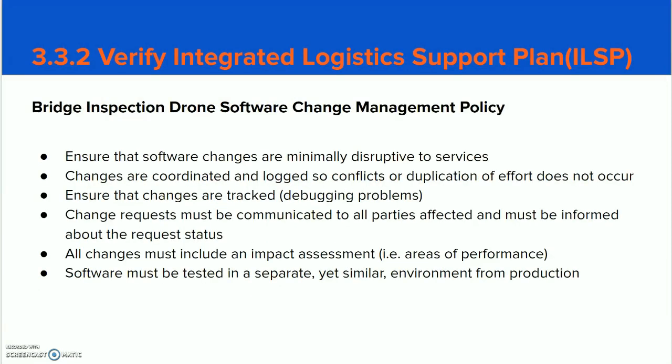Our change management policy will ensure that software changes are minimally disruptive to services, that changes are coordinated and logged so conflicts or duplications of effort do not occur, and that the changes are tracked. Change requests must be communicated to all parties affected, all changes must include an impact assessment, and the software must be tested in a separate yet similar environment to production.